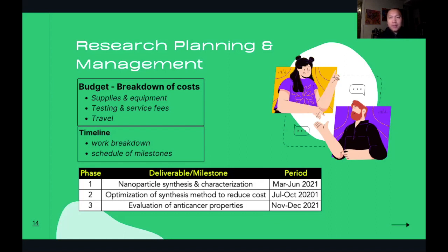Again, it's not only the monetary resources that you are trying to put into detail in the research proposal, but you are also making sure that your funding agency has a good understanding as to when these milestones, or the results, are to be delivered, and that will also give them a sense, is this really a practical plan? Can they really cover the work? Kaya ba nilang tapusin to in just like how long? Like 9 months? If the subject matter experts in your funding agency think otherwise, na hindi posibleng magawa nila to, more likely they will not give you the funding.